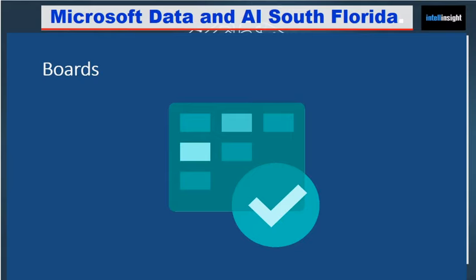Anyway, moving on from there, we better discuss Azure Boards, Sander, since I'm going to be using it to organize our backlog items. Now, Azure Boards can use Basic, Agile, Scrum, or CMMI templates for each project that you create in Azure DevOps. It's worth noting that these templates are actually called a process in Azure DevOps. So if you see anything in Azure DevOps saying that you're able to change a process, that actually means the template of whichever framework you choose.